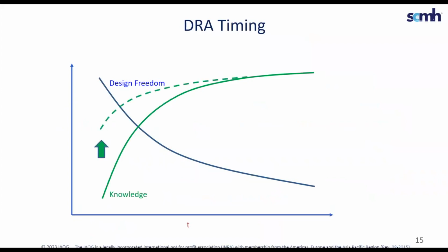Therefore, the greatest benefit can be realized by reducing these knowledge gaps as quickly as possible at the start of product development. The greatest opportunity to identify design risks is with the concept design. This enables design risk analysis findings and actions to be included as part of project planning. Therefore, the DRA should start as soon as possible.